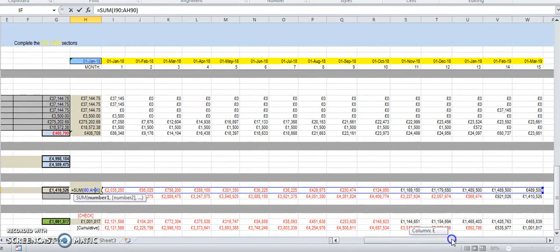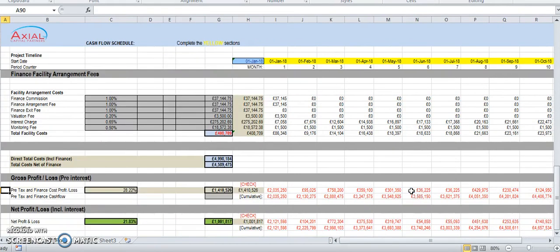Now, through the month-by-month usage of funds, we can see in the red where we have a negative flow of cash until we are back in the black, essentially, where we're starting to show positive cash flows again. And it's based on that, ex finance, our direct profit on cost, our direct profit margin. And in this case, we were running at just under or just over 28%.